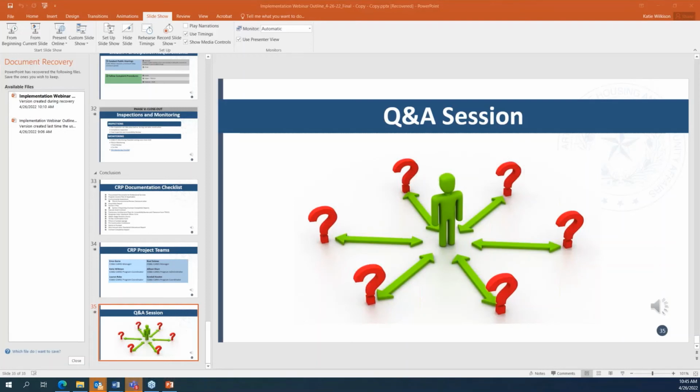So the semi-annual labor standards report is a report that's required to HUD for construction projects. So that's done twice a year. We would be gathering the information from each individual project probably a month before we have to submit, and then we compile the data and information, and then we submit it to HUD for review. But we will be needing information from each of the projects so that we can compile. And we will be going over those.